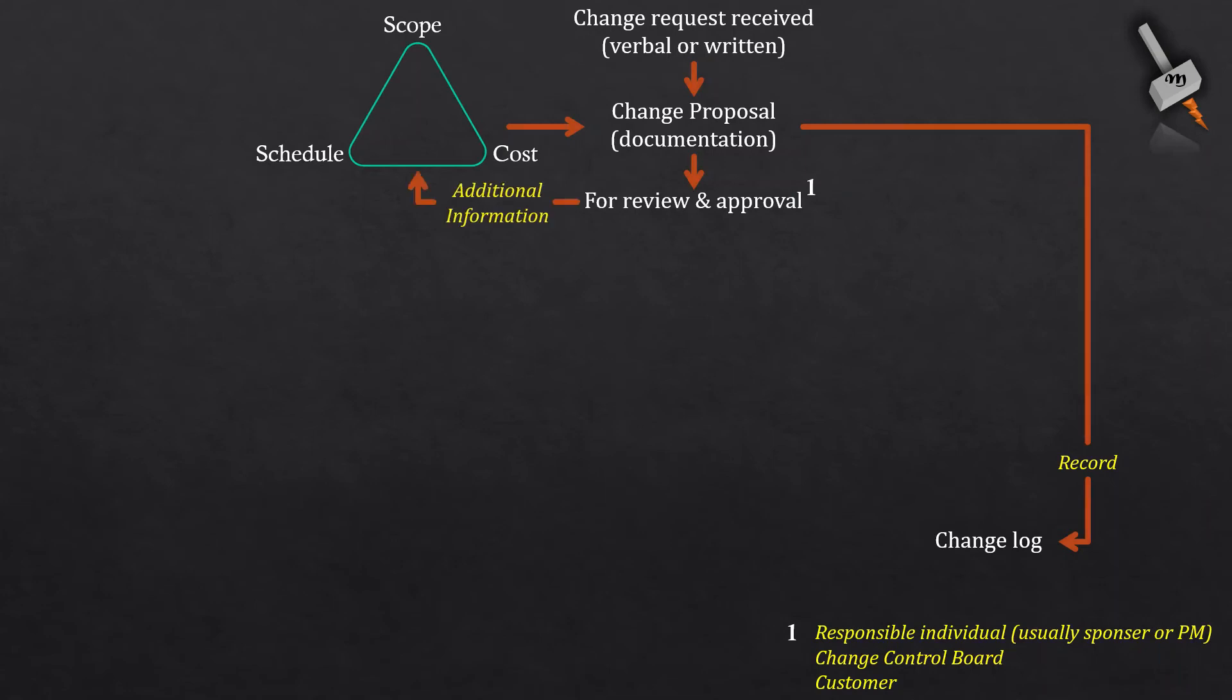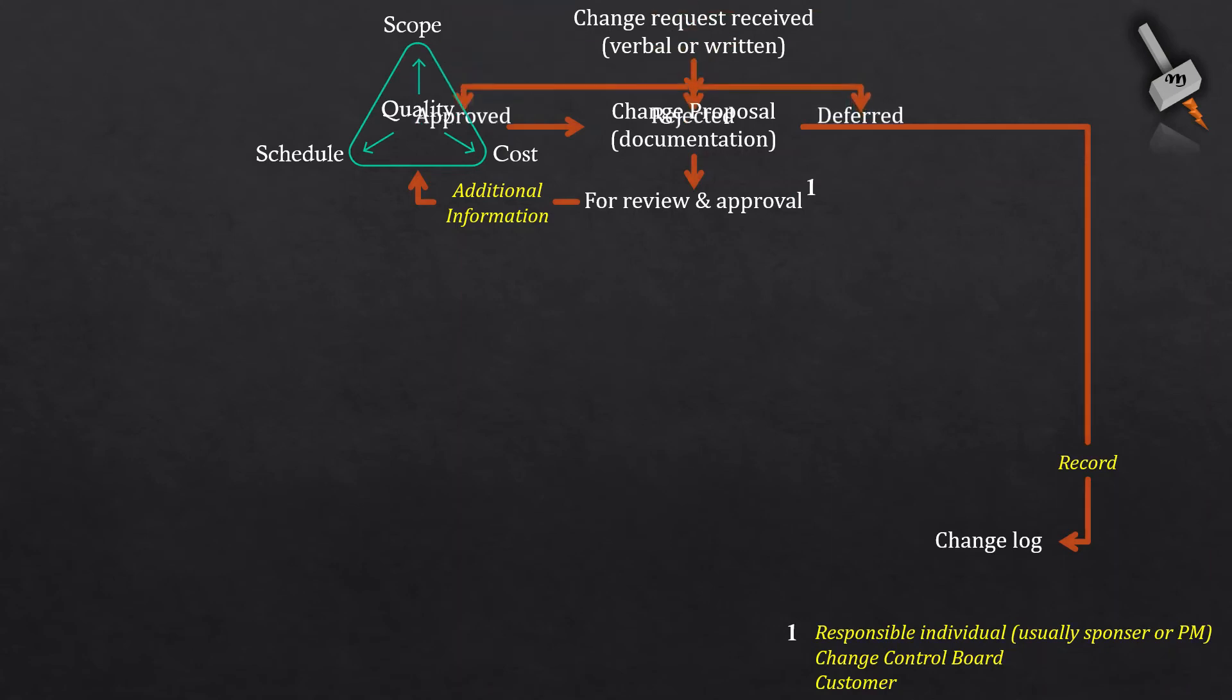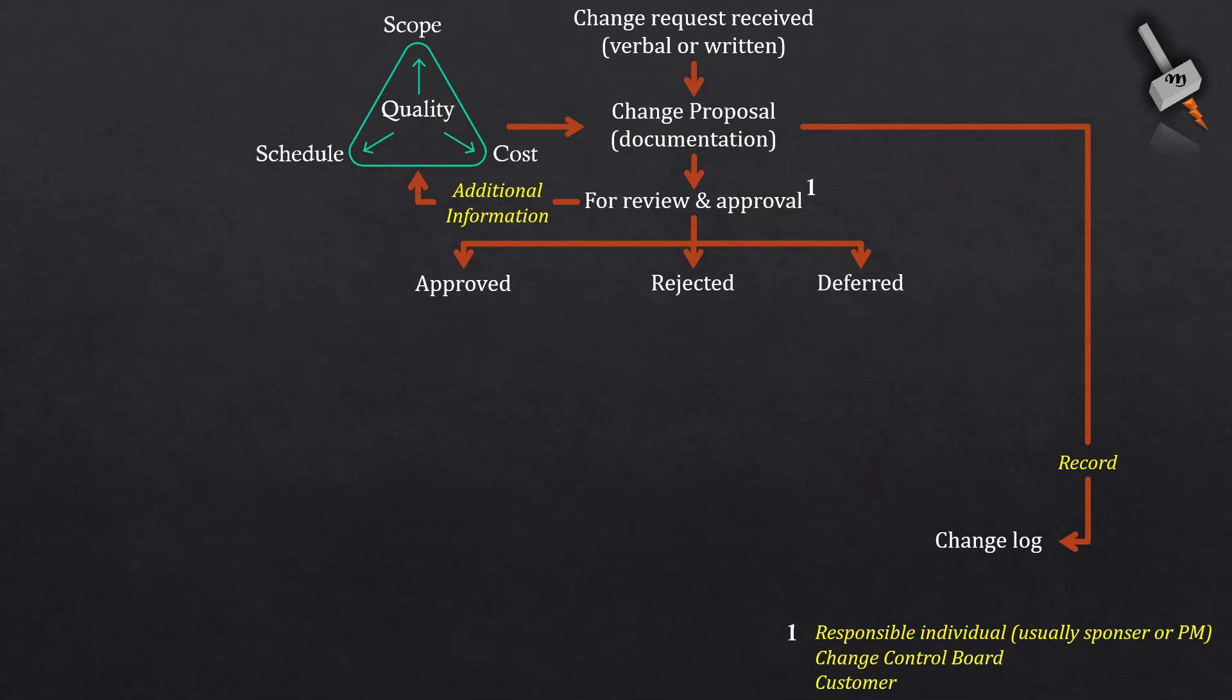The change control board usually comprises of the domain experts or SMEs. The review committee can ask for additional information from the project team for the change request received. After the committee has the necessary information, they can direct the request in one of the three routes: approve the change request, reject the change request, defer it, or put it on hold for future.